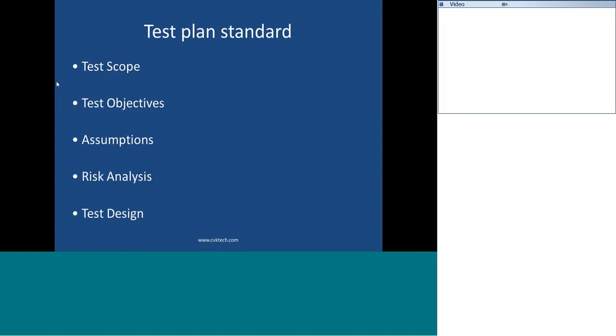So based on the deadlines, our ability of testing is 80%. So 20% will be our risk for the application testing. If the customer is ready to accept that 20% risk, we'll deliver it. If not, then we'll try to look for some other alternative or some other backup. We may add a few more resources to the project.